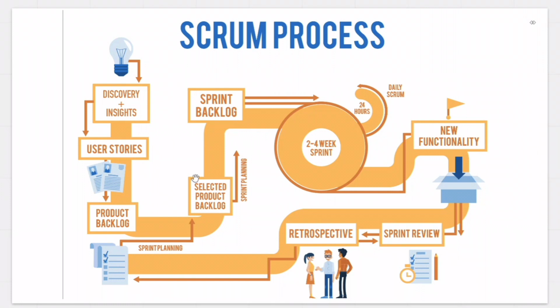Sue, here's your task, just breaking it all down into the sprint. And then when the sprint ends, there's a retrospective to talk about, well, what's working, what's not working, how can we improve? And then it just goes on repeat, and that's how sprints work in the Agile and Scrum format.